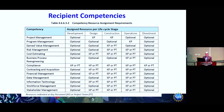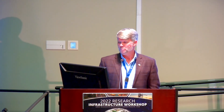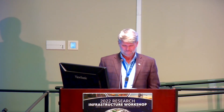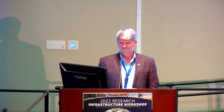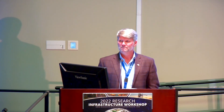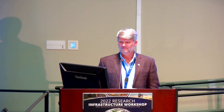Jeff Zivick, University of Chicago. If I was sitting next to you now, I would be pushing harder to make risk management and earned value management required during design — because it's in that stage that you're developing contingency, and you should have somebody with risk management experience. And if you're proposing earned value, you have to design that earned value system in during design. So I would vote for including those. Very good.